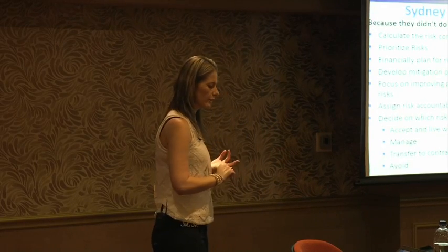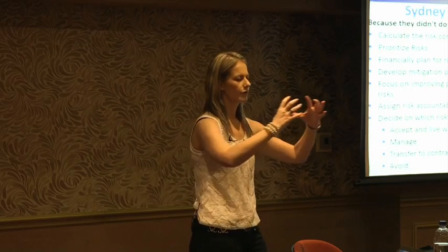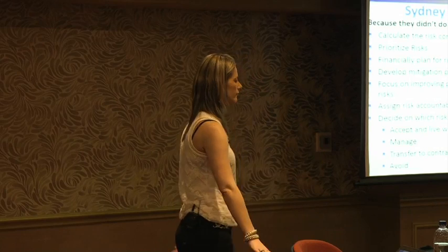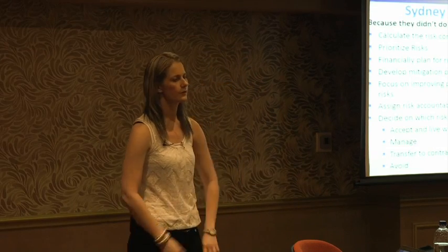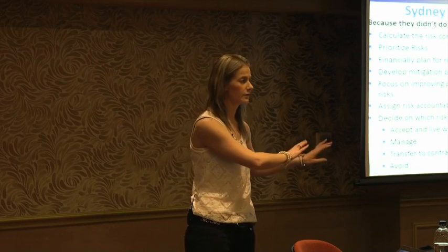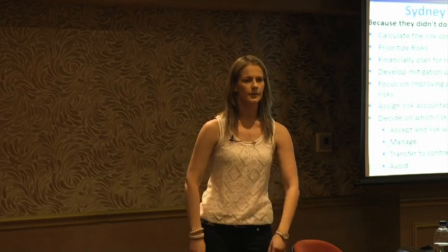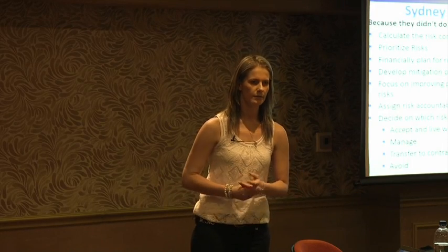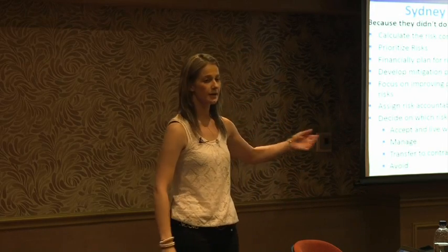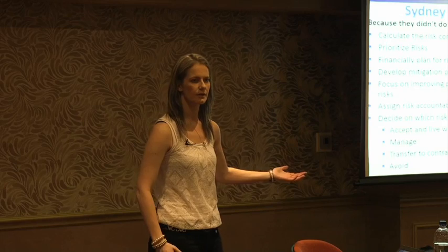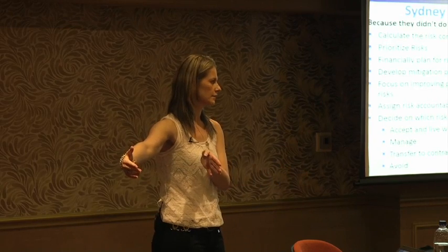Secondly, for every week we overrun and the client can't operate this facility, he is losing 5 million rand in revenue. So for 4 weeks, the client's going to lose 20 million rand, and your contractor is going to charge you 2.5 million rand a week. So basically it boils down to 30 million rand. To buy out a production line and fly in your valves is going to cost you 20 million. So we would rather pay for the mitigation than face the schedule slippage.